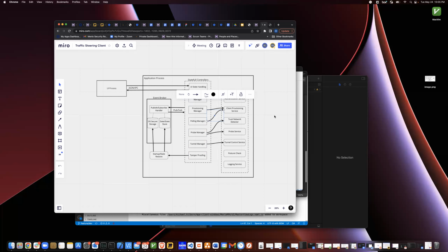Just give us a ballpark figure for an order for how things are going to be done. If the server team is not ready to do something, then we can do something else, or we can mock it up with some fixtures and unit tests, that sort of thing.